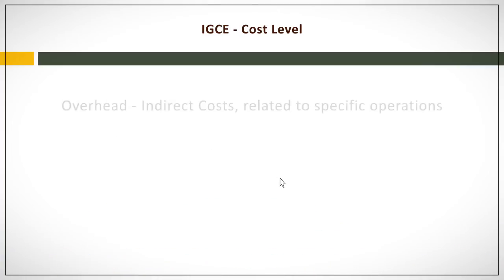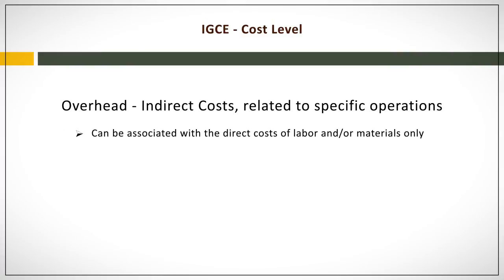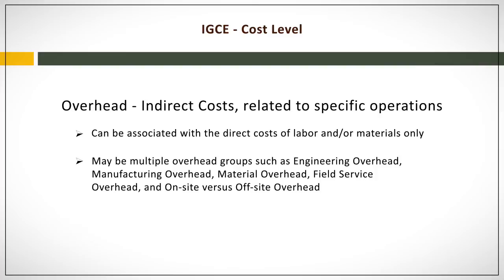Of course. Overhead costs are indirect costs related to support of specific operations. There can be overhead as an indirect cost to one, two, or multiple different cost categories. For some industries or companies, overhead can be associated with the direct costs of labor and/or materials only. In other industries or large companies, there may be multiple overhead groups, such as engineering overhead, manufacturing overhead, material overhead, field service overhead, and on-site versus off-site overhead. Overhead is typically expressed as a percentage of the direct cost category it is associated with.